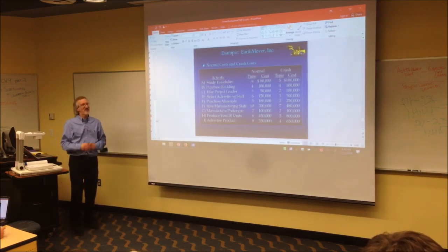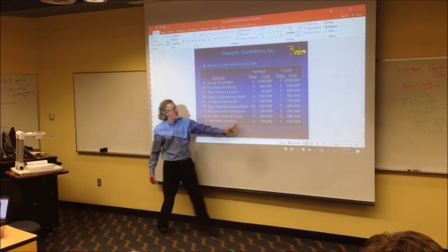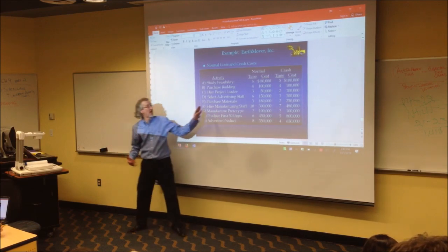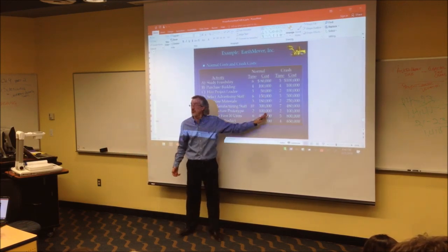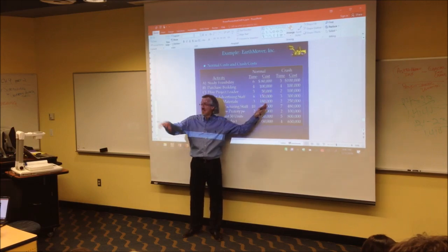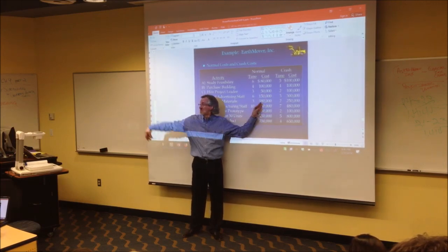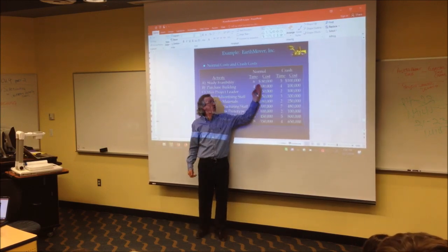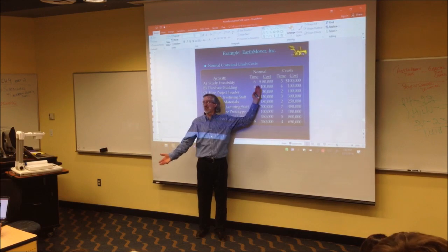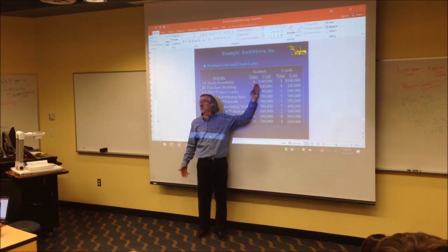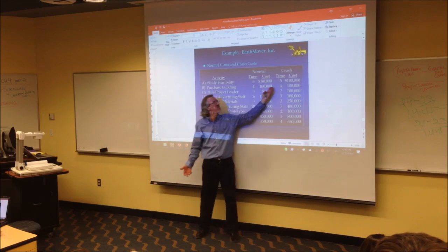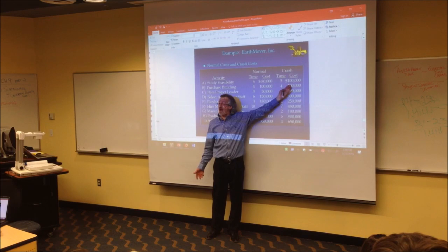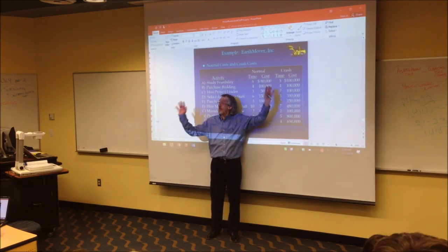At that point, everybody who's involved in all the activities and these activity times and these costs has to get on the phone with everybody that was involved in coming up with these numbers. Usually this is subcontractors, but you have people in your office that help gather this information. Whoever was in charge of this activity has to call them up and say, look, can this get done any faster? If you have additional help, could you get this activity done faster? Yeah, we can get it done in one less day or one less week, whatever this time is. But it's going to cost an extra $20,000. Okay, thank you. I'll get back to you.